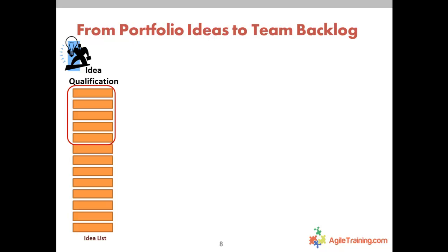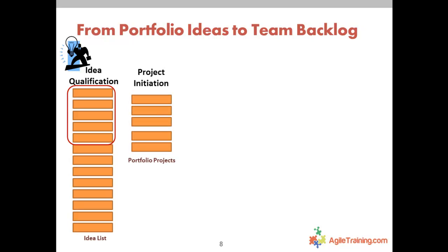It should be where basically these ideas have to pass some basic filters of qualification to even know if we should initiate them. An initiation, and I'm sure you guys have a name for all this, some people call it the business case, the idea qualification step, the project feasibility step, whatever you're calling both those together. The idea here is I got to filter the list of these humongous things that everybody wants to do. Then I need to initiate and figure out, based on value, which are the top ones that are really worth doing.